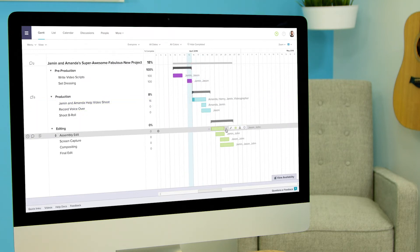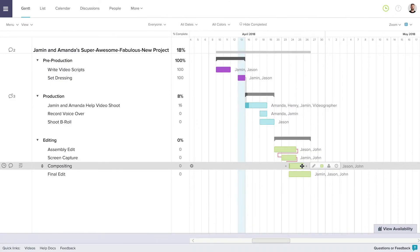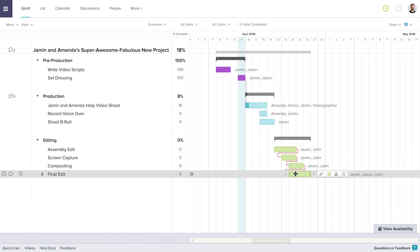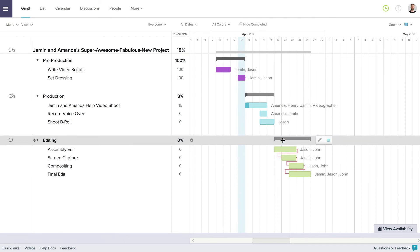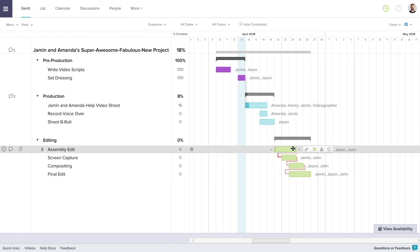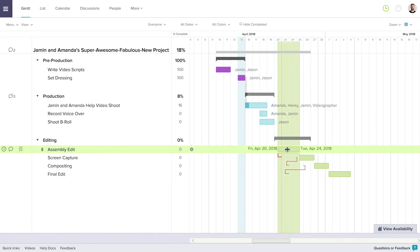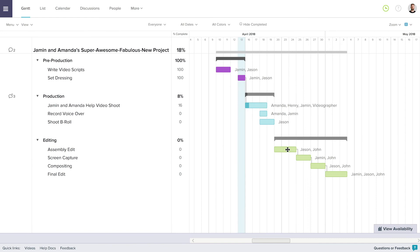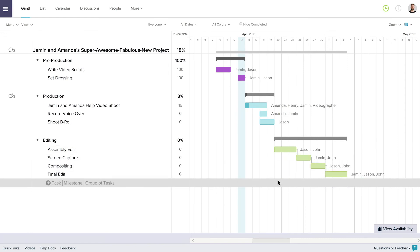But if you have a string of dependent tasks out of order, an easy way to quickly adjust all of them is to click and hold the top task in the string and shake it in the timeline. When you release the task, all of the dependent tasks will reorder to begin after the task they depend on.